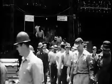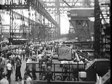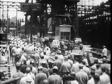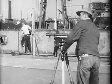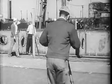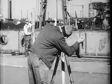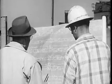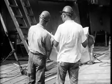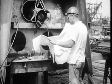That job took thousands of men, more nearly 5,000 workers on the ship itself from 40 different trades to meet her production schedule. They based the locations of major construction points on the precision of a center line, accurate and close enough to split the hairline of a lens. Over 6,000 plans were needed to build this ship. Plans that told the shipwrights, welders, anglesmiths, the pipe fitters, coppersmiths, machinists, and electricians exactly what to do and where.